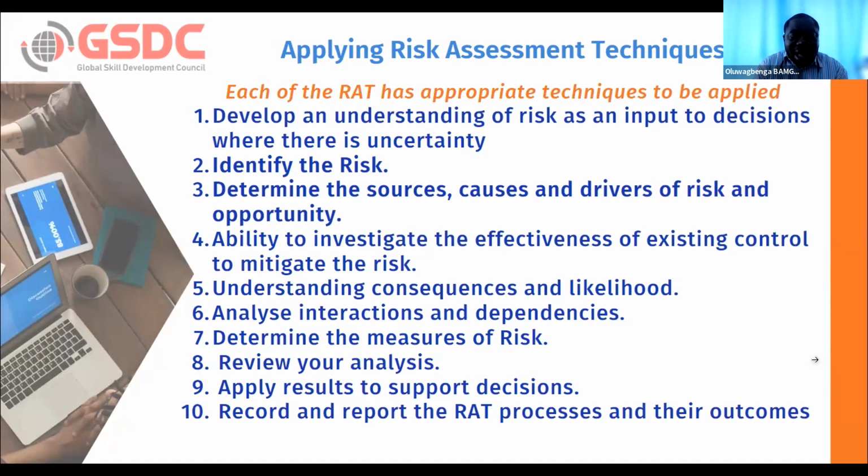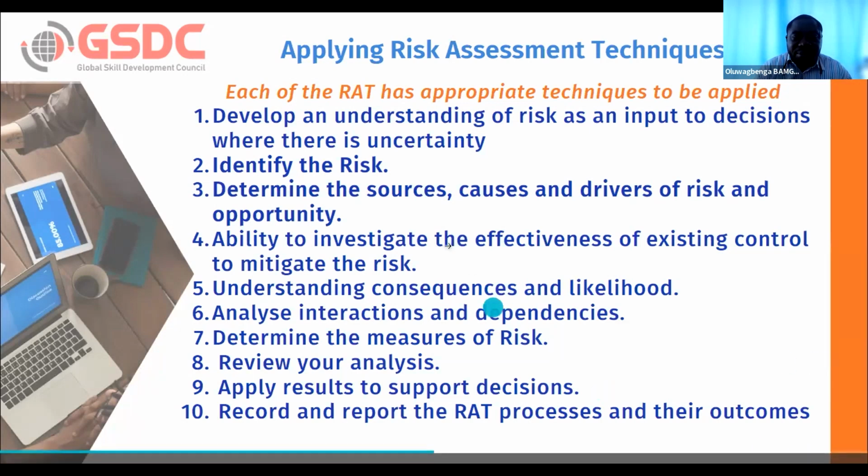Then, analyze interactions and dependencies. Very, very important. Analyze your interactions, dependencies. Then you determine your measures. How do you intend to measure the risk? Okay. And of course, review your analysis, apply your results for decision-making, and most importantly, you need to record, communicate, and report the outcomes to all your necessary stakeholders.